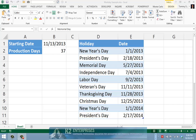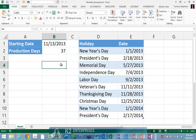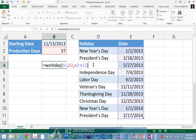Next, to calculate the estimated completion date in cell B4, enter the following formula: equals Workday, open parenthesis, B1, comma, B2, comma, E2 through E11, close parenthesis.